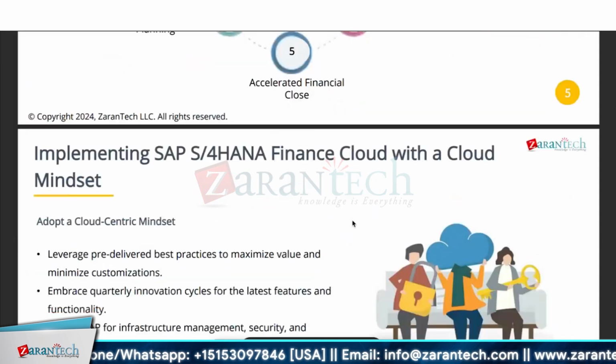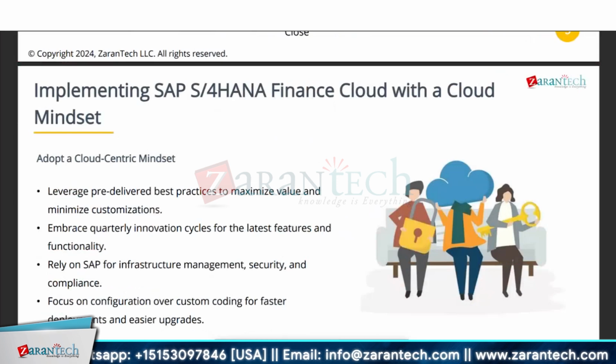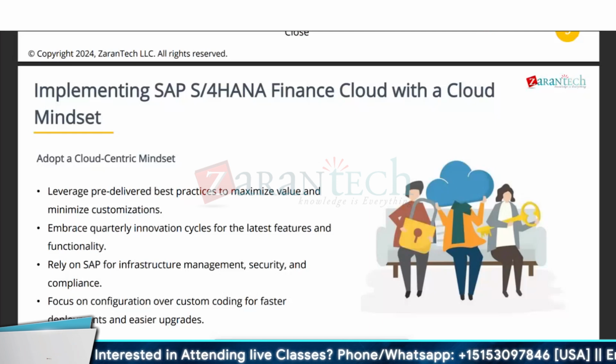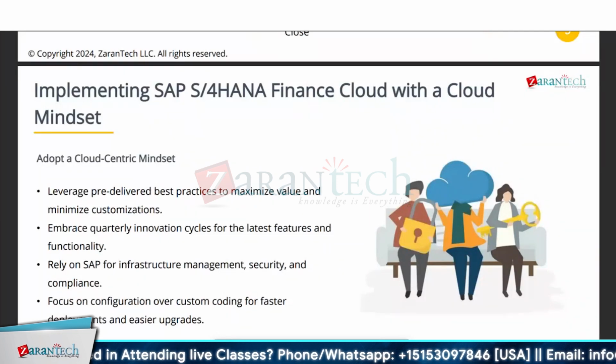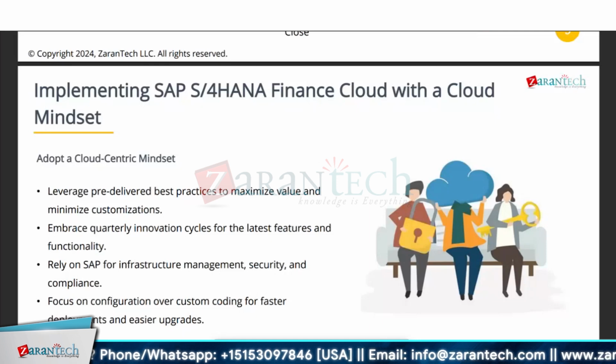Okay, so this need to know approach is very simple. It's like an activate methodology. But yes, in this need to know approach, everyone has to understand a few things. We have to assess the organizational readiness, define the implementation goals, assemble your implementation team, and conduct gap analysis. These are the four very important things you have to do whenever you do any need to know approach. Because in this, you will evaluate your organization's readiness, whether they are ready to implement the finance cloud or not. If they are not, you can know that too.